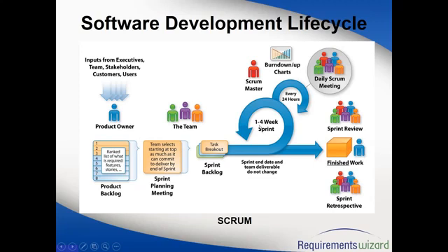So different teams will have different sprints or sprint cycles. As I said, you can have minimum 1 week or max 4 weeks. You can pick any range in between. But generally it has to be either 1 week, 2 weeks, 3 weeks, or 4 weeks. In my project, we have a 3-week sprint cycle. And in certain different projects, I've seen 4 weeks. I've also worked on a sprint which was 4 weeks long. There is basically no right or wrong answer here. You can pick based on what your team needs.